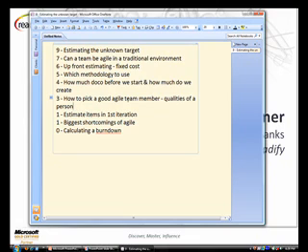The theory with function points is that the more functions there are in a requirement, the more time is going to be required to deliver it. Same with an agile situation. You've got a use case or user story, whichever way you're working, a requirement, and you try to get a size on it, a handle on it, so you think about what's involved. Is this going to be bigger or smaller than another item I've estimated? You end up with a certain number of points, regardless of which method you use.